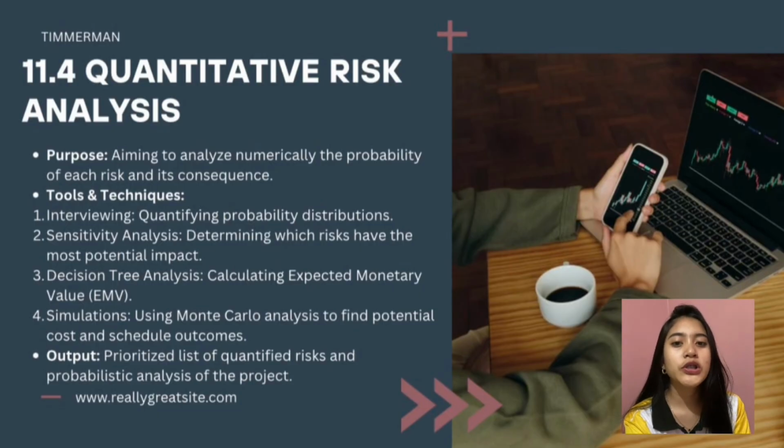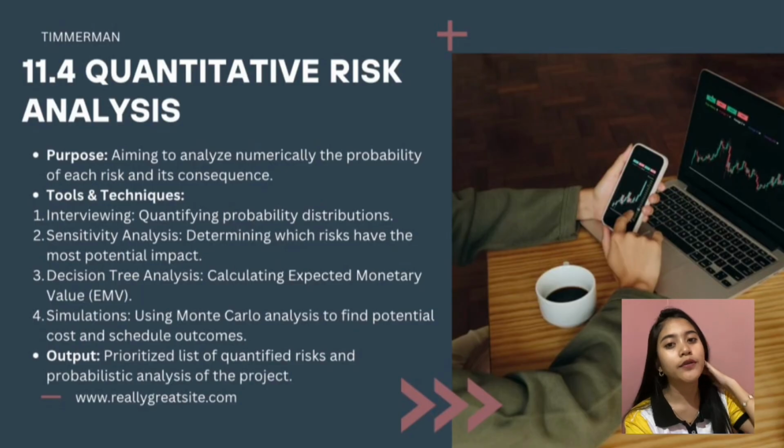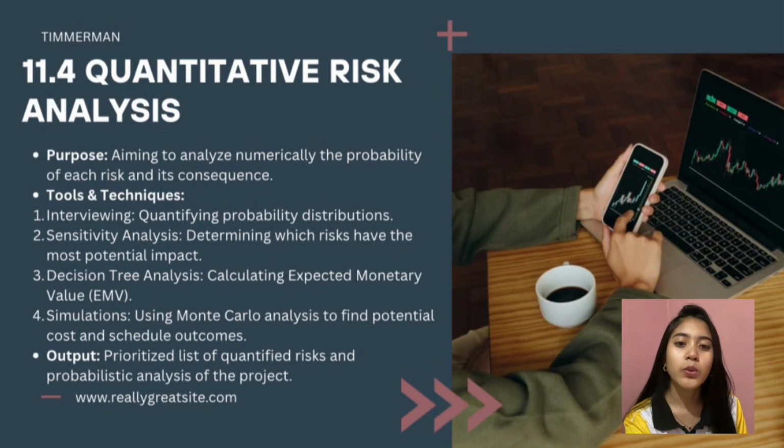So third is decision tree analysis. This method uses a graphical representation of decisions and possible outcomes to calculate the expected monetary value or EMV of different choices. So by evaluating probabilities and financial impacts, project managers can determine which decisions lead to the most beneficial outcome. So another important technique is simulation.